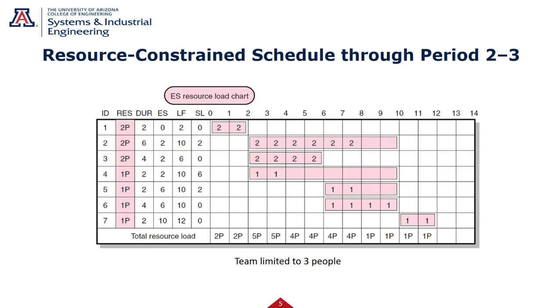Okay, so I have 5 heads. I could do tasks here. I could do these 2. I'm only giving you 3 heads, I'm sorry. I have 5, I'm giving you 3. So I could add these here and get those done, but then I'm going to have to push this out. So I can push it out here. Here I could push it as a minimum to here. I have to push it.